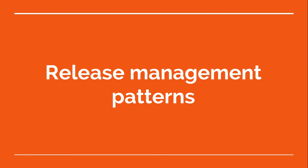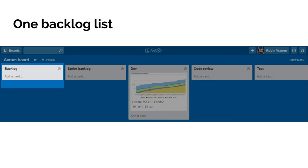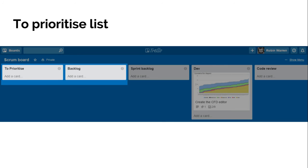I'll just talk quickly about some of the release management patterns I've seen people using. So far we've just had a board with a scrum board basically, with no backlog on there. And then we'll talk a little bit about some of the plugins that are worth looking at. The first obvious one is to add a single backlog list, prioritized. And when the devs are sprint planning, they can pull from the top of the backlog into their sprint backlog.